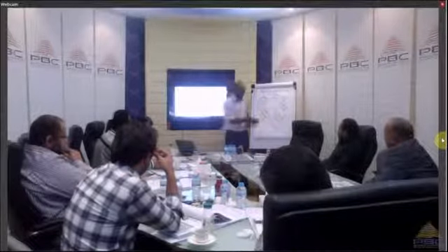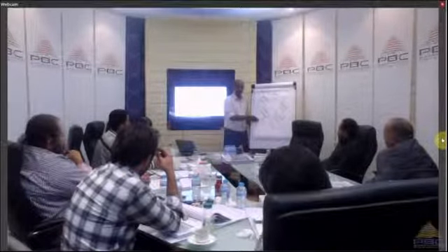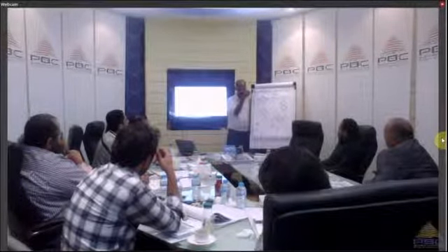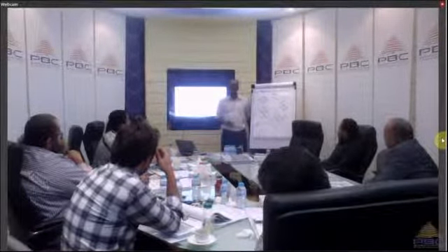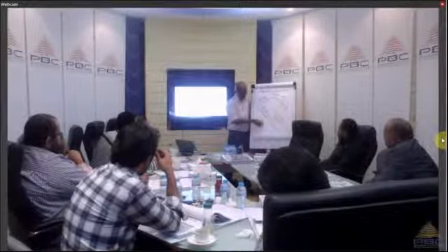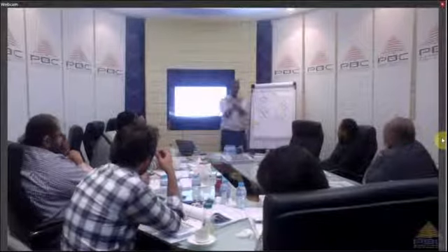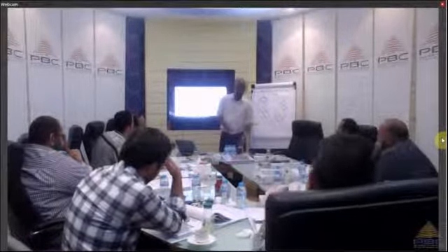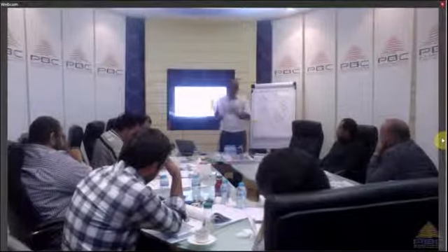So for some activities, let's say for example in IT, the activity is develop the program, and another activity is develop the manual for the program. So I can do this first, then this, or this first, then this. Discretionary, meaning optional. Okay, so you have the flexibility of doing this and that.